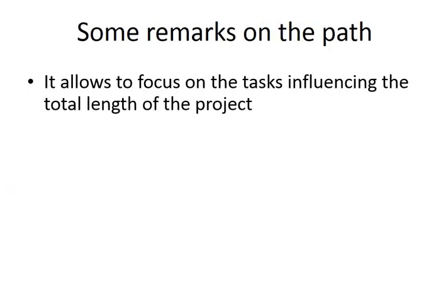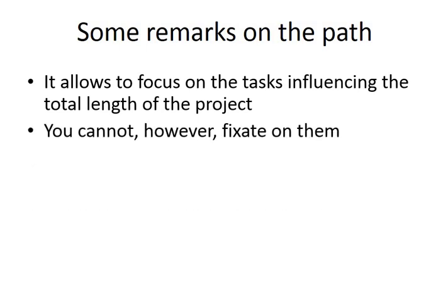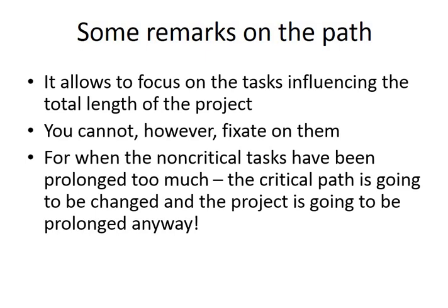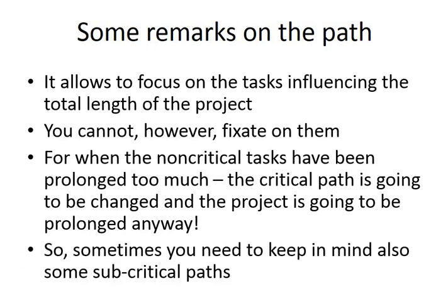Some other things are important. So if you care about the length of the project, first of all, you pay attention to your critical path. Of course, you cannot forget about all the other parts, because they may become critical one day. So you also think about them. But to make your project shorter, the first thing you do is try to make your critical path shorter.